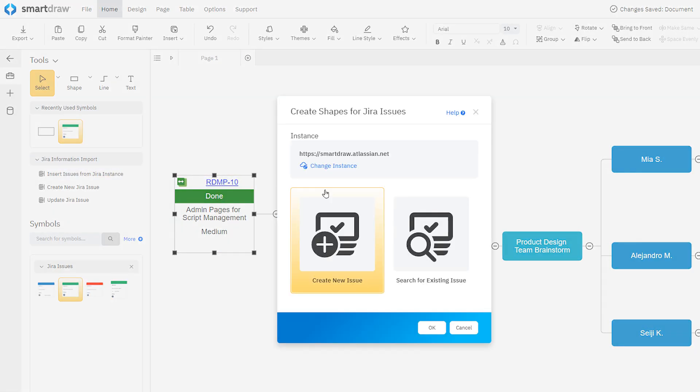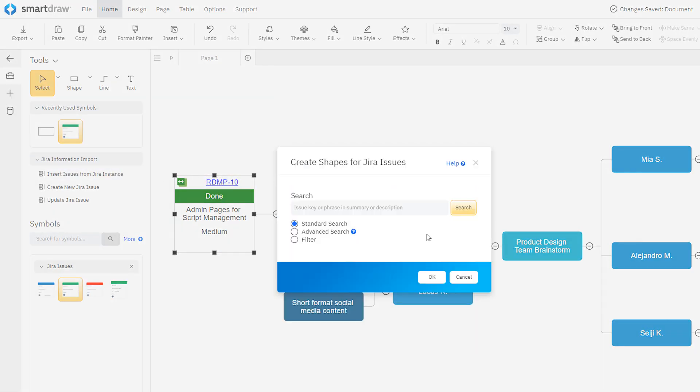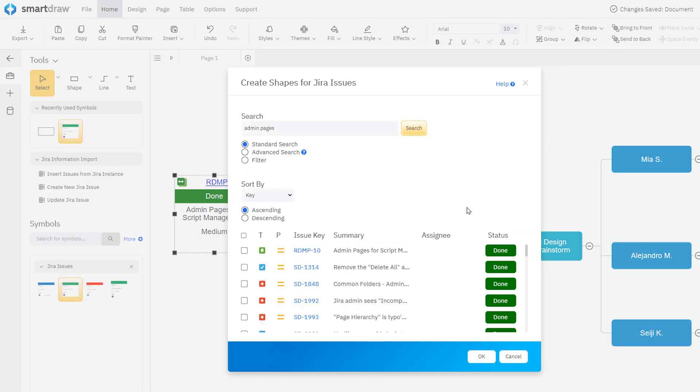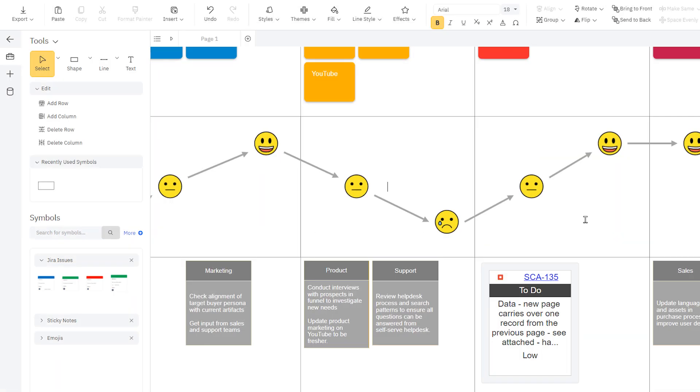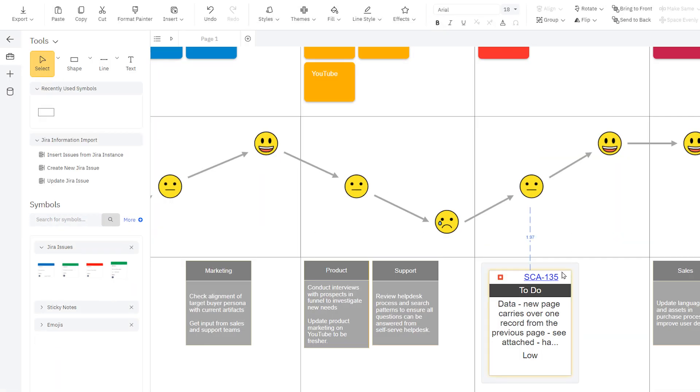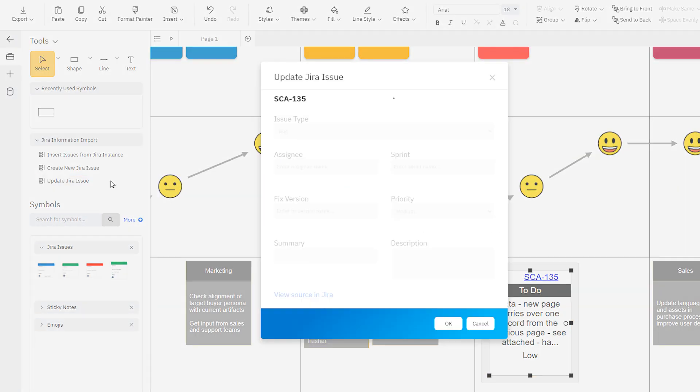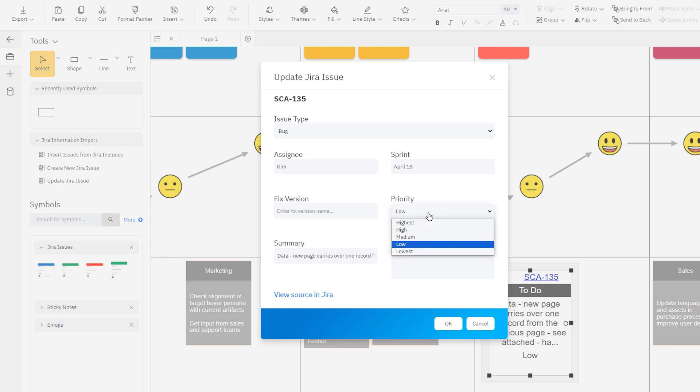Once you've imported some JIRA issues, the SmartPanel tool view will have some relevant commands that let you update JIRA tasks, and even create new JIRA cards to push into JIRA. To update a selected issue, click on Update JIRA Issue. You can edit all the standard fields in the JIRA issue, and click OK to push your update to your JIRA instance.